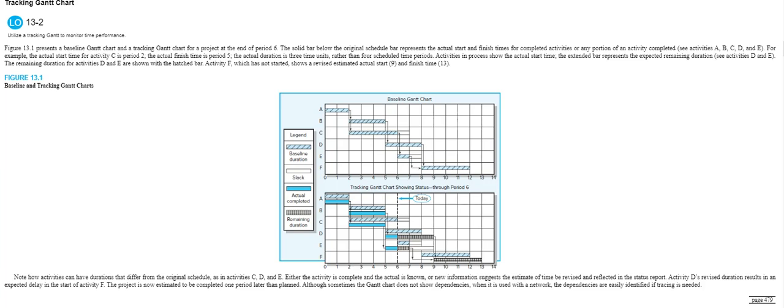So some principles that are important to remember for project reporting in the baseline. Number one, why set a baseline? You have to be clear about what it is that you're committing to in terms of schedule, scope, and budget. Number two, all must agree on this, your client, your sponsor, stakeholders, so there's no doubt in anyone's mind to what is being committed. Number three, once the baseline is in place, no informal changes are made. They're all formal. They're never approved automatically. They're requested and then evaluated.